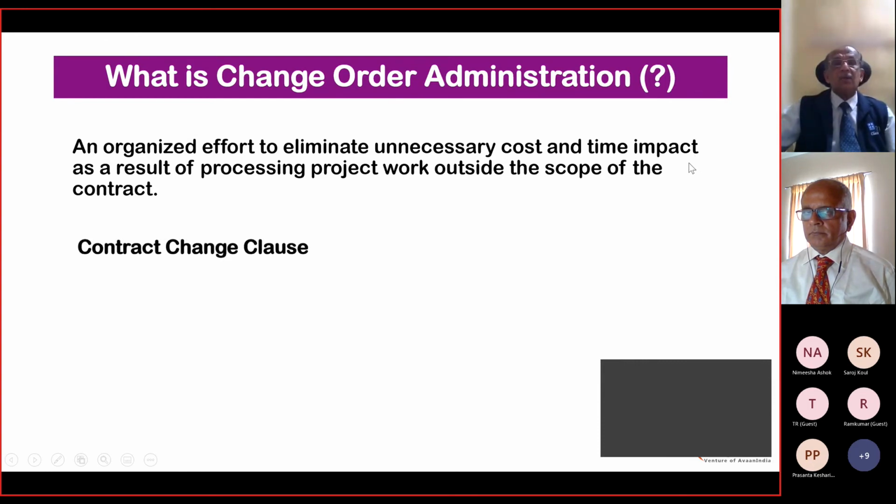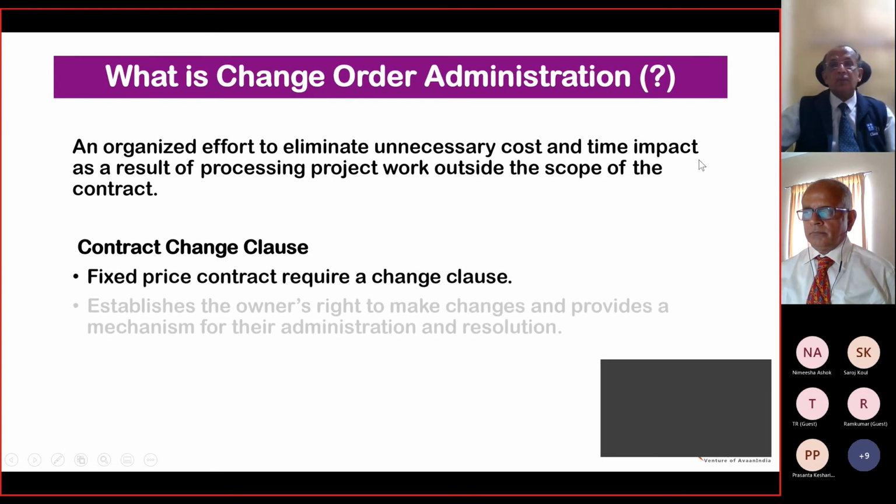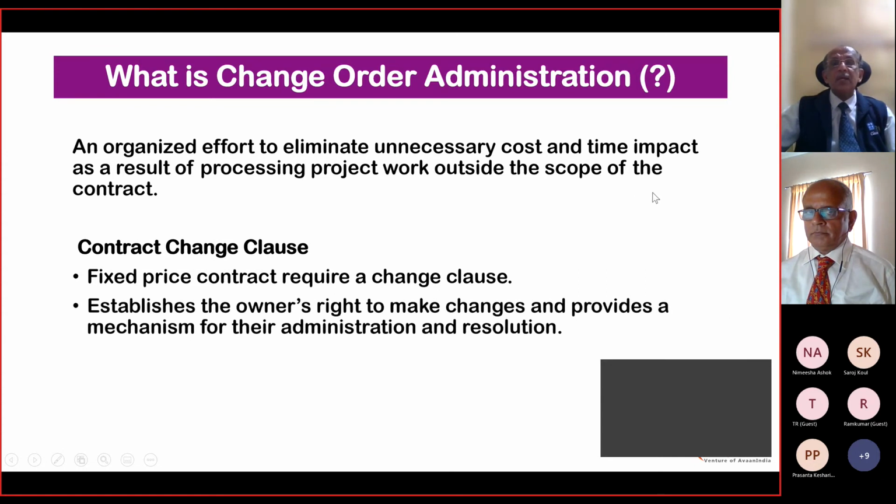Contract change clause: a fixed price contract requires a change clause, which we talked about. It establishes the owner's right to make changes and provides a mechanism for their administration and resolution. So it's essential, for the progress and well-being of a contract, that change orders be looked at logically, to see whether it's absolutely essential and whether there is truth in what is being stated.